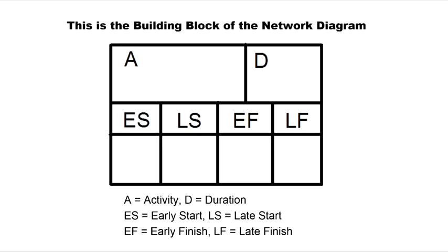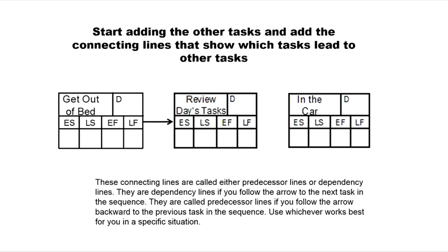The late finish is the latest we could ever finish this task and still have the project come in on time. We need that information, and then we can put together a schedule. We'll start to arrange our tasks, put them together in whatever order we think they go in. So we're going to get out of bed, and the next thing we think we're going to do is review the day's tasks.